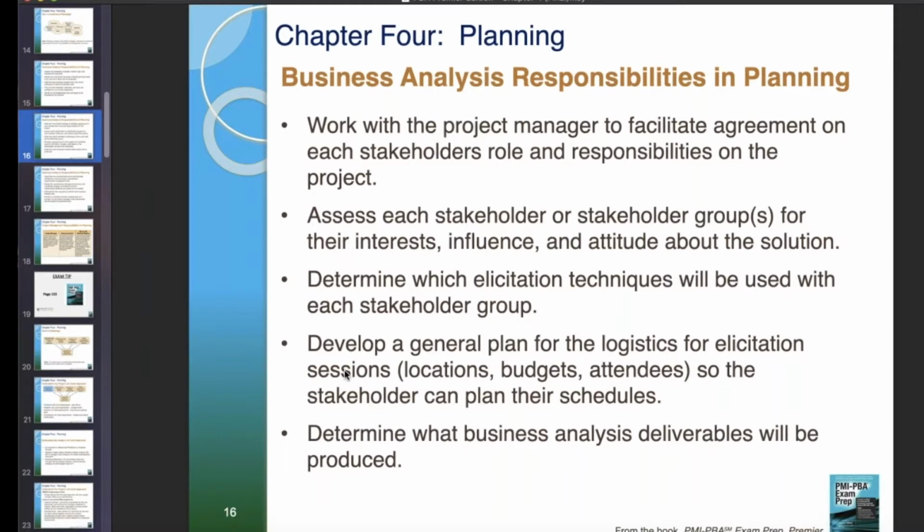Someone tells you, oh, I need the following, and you can use MoSCoW to prioritize. Well, is that a must have, should have, could have, or would like? And then you can just do a scale and say, if it's a number 4, it's incredibly important and needs immediate attention. It's a number 3 if it needs to happen, just not right now, but it's a need. It's a 2, like MoSCoW. Must have, should have, could have, would like.